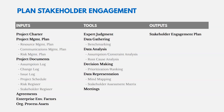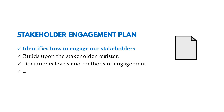Various tools help determine how to best engage your stakeholders: benchmarking, decision making, prioritizing and ranking stakeholders, and a stakeholder assessment matrix to figure out who to focus on. There are often lots of potential stakeholders, but you want to focus your time and energy on those who could most influence the project or are funding it. The stakeholder engagement plan identifies how to engage stakeholders, builds on the stakeholder register, and documents levels and methods of engagement — especially for critical stakeholders.